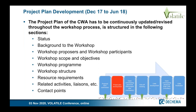This project plan is absolutely mandatory for a CWA, and it has to be continuously updated throughout the workshop project. You will see the sections: the status of a document or CWA, the background of the workshop, the proposals, the workshop participants, the scope and objectives, the program, its structure, the resources which are required, and if there are related activities and liaisons they have to be mentioned, and the contact points for any questions have to be documented.